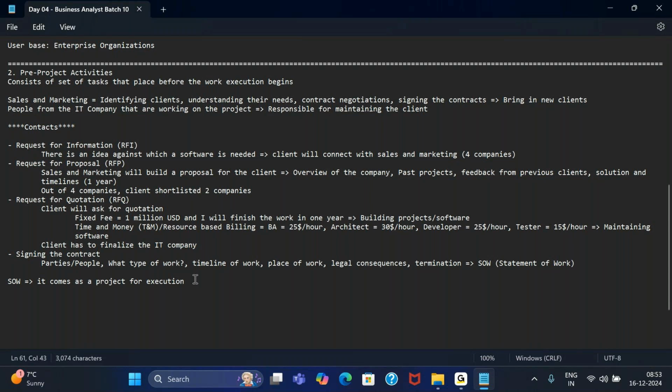Sometimes it may happen that during the initial discussion you said, I'll give you the entire work in 1 year. Maybe it took 1 or 2 months to sign the contract. In that 1 or 2 months, your requirements have changed or evolved, and you want some more things to be included, which cannot be done in 1 year. So the product managers will come in at this point to do a high level analysis of whether everything still holds good or not.